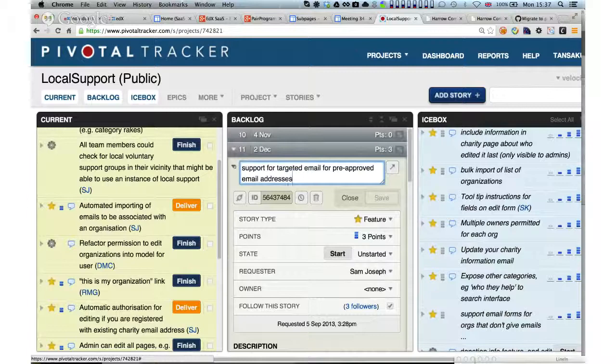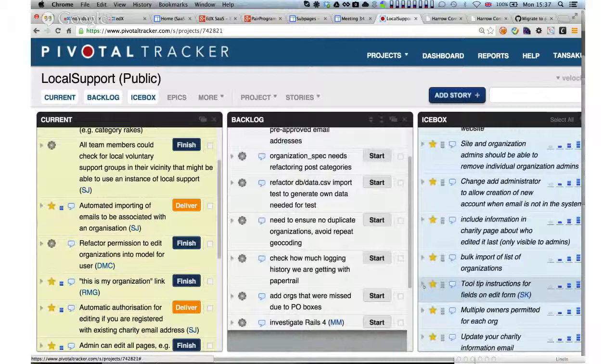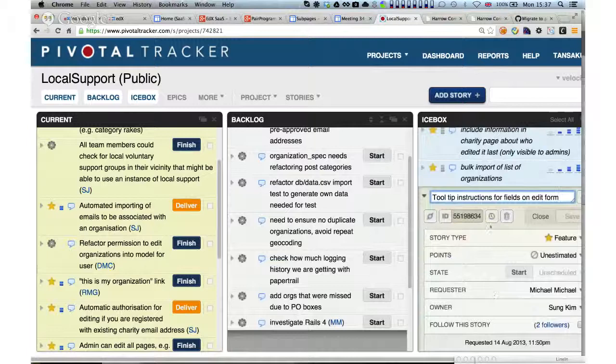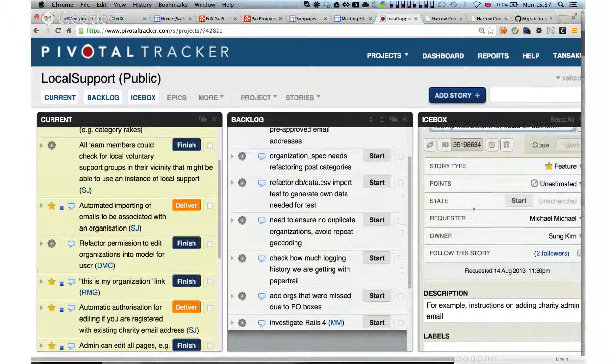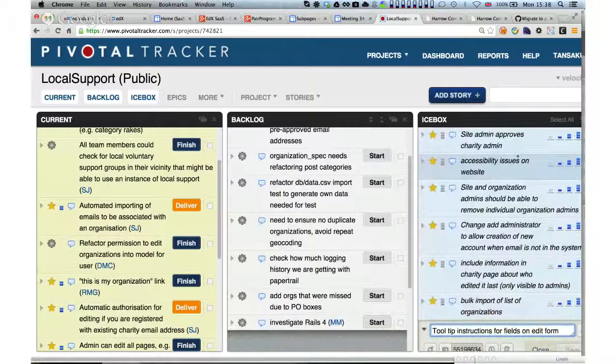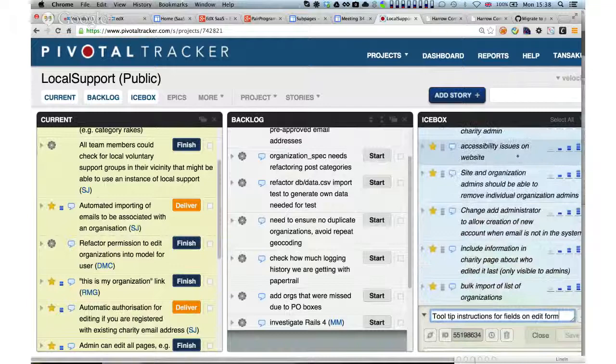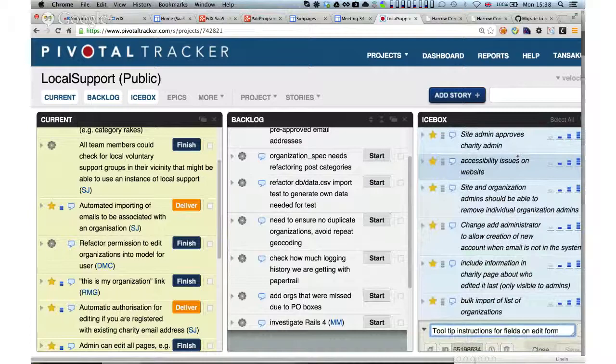The ultimate thing would be later on adjusting it so the admin could edit the tooltip text, but we won't go there — that's a different feature. I've heard enough to take a vote on this feature. Does anybody want further discussion before we vote? We're voting on complexity: low is one, medium is two, high is three. Type your choice into the group chat and we'll hit return at the same time.